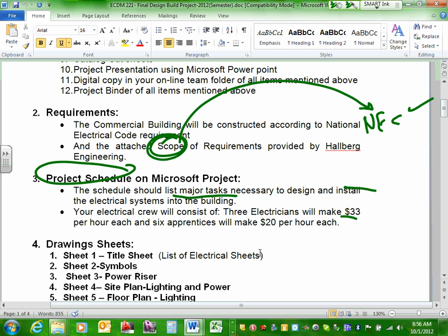And the installation of the electrical system, pre-design, design, construction, and so forth. We're going to have 3 very competent electricians in this schedule. This will help you also for the estimation. Jeff is one of them, and Darren is another. They're electricians. We're going to pay them $33 plus benefits, of course, right? Almost union wage plus benefits.